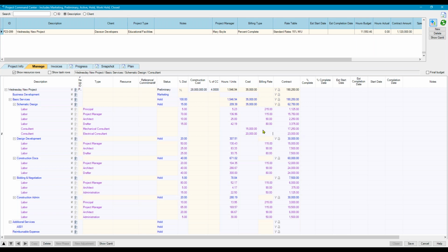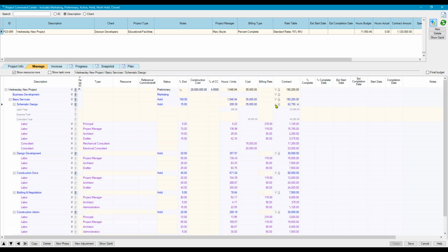There's a markup on my rate table, you can tell here, right? Because my cost is 15, but I'm going to charge that much. The system automatically knows if we use this correct resource type, that on this phase, 22.5 is my labor budget and my consultant budget is 40.25, which is these two lines. So again, I could have had that in my template, so it was easier for my team to fill out here.